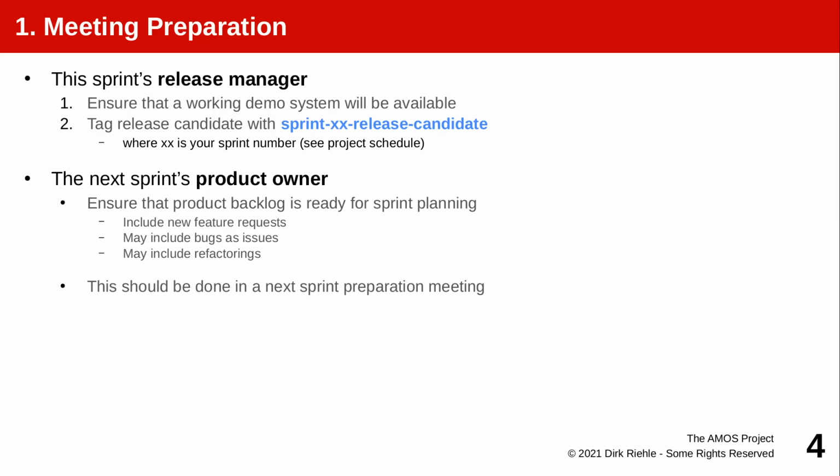For that, the release manager, usually the night or the day before the team meeting, makes sure that all commits that are supposed to be in are in, and makes sure the software builds. If something fails, they will have to prod the respective developers or kick their commits from the demoable version.